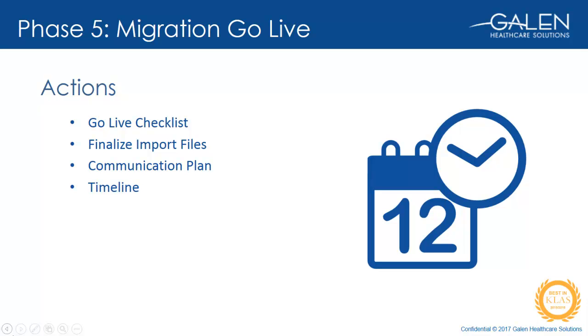But going along the idea of the migration go-live phase as a distinctive sequential phase, then at a high level here, one of the deliverables we are looking for is the creation of a detailed checklist. This checklist will basically serve as the guidebook for outlining and tracking everything related to the migration that must be done as either a prerequisite for the go-live to kick off, or be done during the actual migration or as follow-up to the actual go-live event.